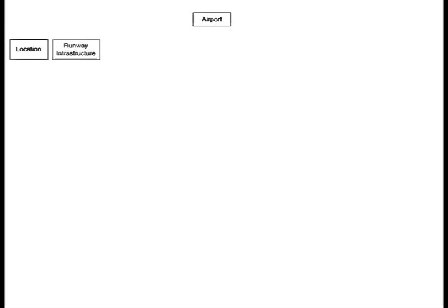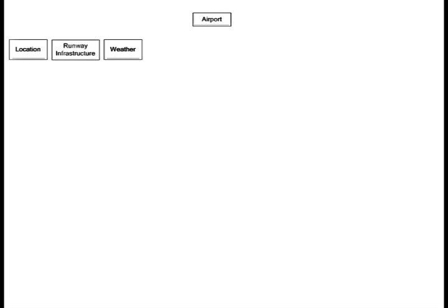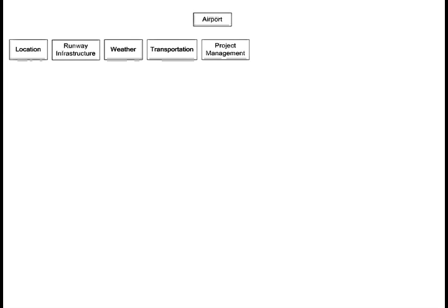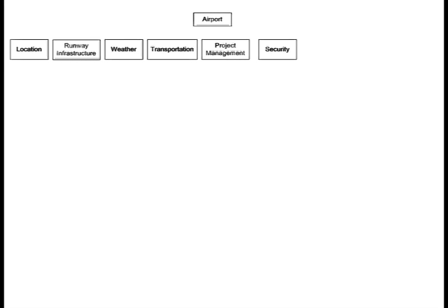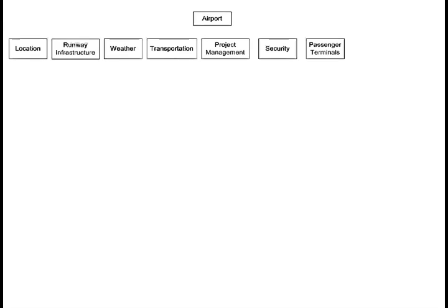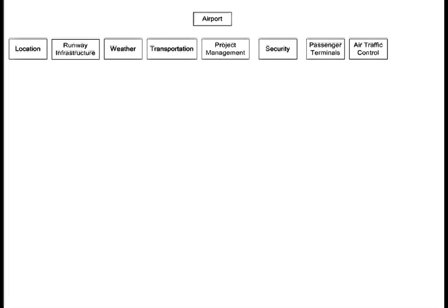The WBS has a focus on what is to be done. It doesn't care about how the deliverables will be created or who is going to create them — it's all about what, and for that we only need nouns. At the next level, we could decompose the airport into its major parts: location, runway infrastructure, weather forecasting, transportation (roads, rail systems), project management, security, passenger terminals, air traffic control, and aircraft maintenance.